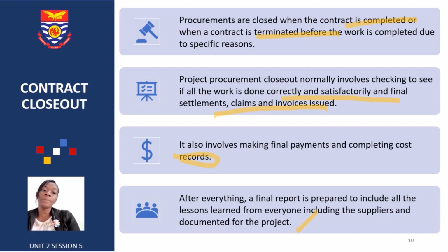But if you are being diplomatic or you don't do it well, you end up having an appraisal, but you won't be able to come back to it to use it for future decision making. And so it is very key that when you are done, you're able to do a report on the various people you've worked with, especially your suppliers, how they were, and all the lessons you've learned when it comes to dealing with them or working with them. This is very, very key as well.